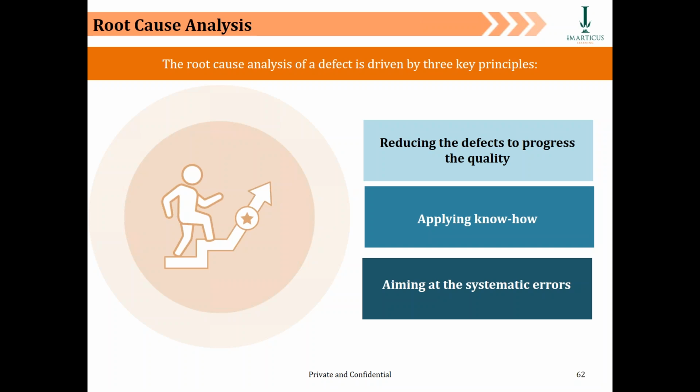So root cause analysis aims more at evolving the qualitative part of your system rather than the quantitative. Obviously, root cause is great. You see recurring trends happening, you make a solution and put it in. All those recurring trends will never come up as bugs. This means in one stroke you eliminate maybe 10, 20, 30 bugs which were otherwise coming in a month.